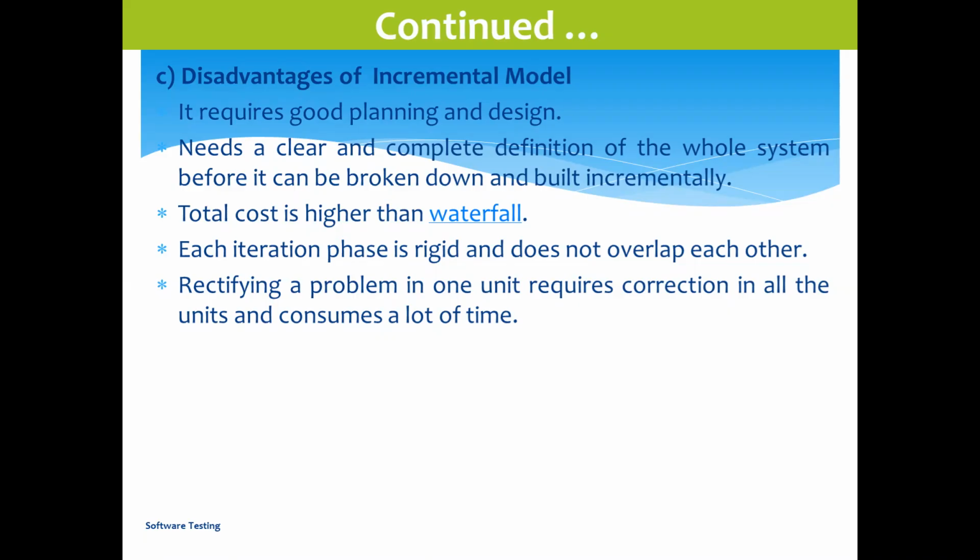This is the rule in the incremental model. Due to some reason, like a network issue, a virus attack, a deadlock situation in the project, someone suddenly going on leave, or an application crash, suppose we are not able to complete by Friday. That will be a great problem. If it is not completed, the second build also cannot start. The second build will be delayed, the third build will also be delayed. Everything will be delayed. That is the disadvantage here.